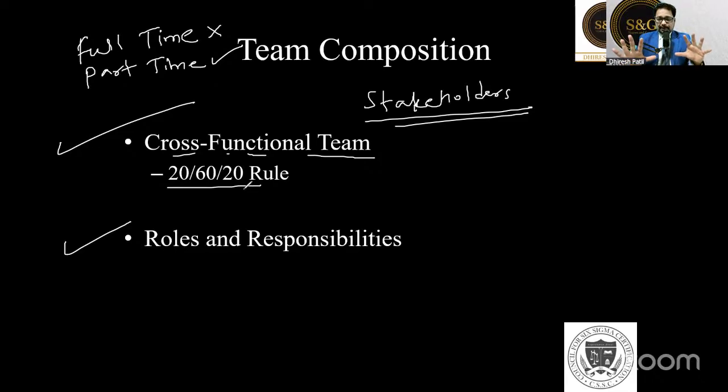For example, let's say there is a problem. I'll give you two scenarios. If there is a problem and you are the Lean Six Sigma expert, your role is not to find the solution. Your role is to impart the knowledge of Lean Six Sigma and let the team decide the problem, root causes and solution. They will own that solution and they will implement it. If you identify the problem and give the solution, they will resist. And that's where resistance comes.